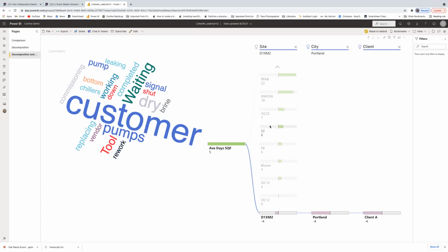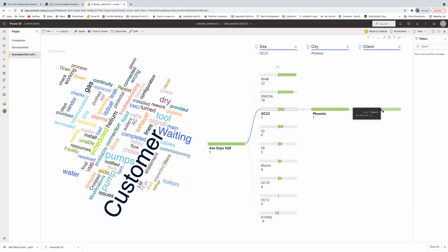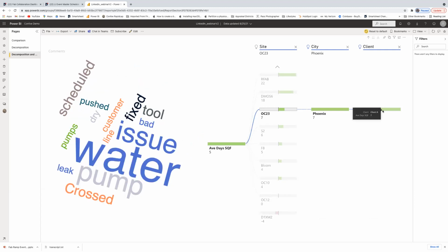If you look at the high volume, okay, so we see at the bottom of that particular site, and we haven't sanitized the data for any flyers or anything that might be potentially driving the data erroneously, but of course that's what this is for. On average, 4 days behind schedule to supplier qual finish. If you go to high volume, 7 days ahead of schedule. So a delta between the two sites of 11 days in performance. 11 days is a pretty significant amount for the same tool type from one fab to another.